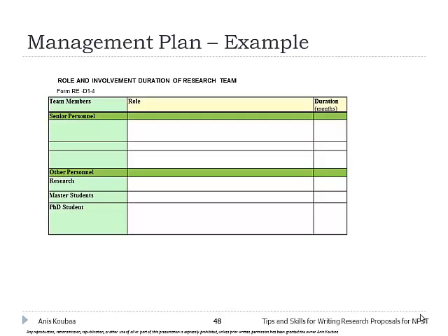And of course this is critical because later on, when you are going to write the progress report or the final report or the review report, you have to write what each member did in the project. So the reviewer of the final report or the progress report will go back to your original proposal, check the planned activities, and compare them to the executed activities.